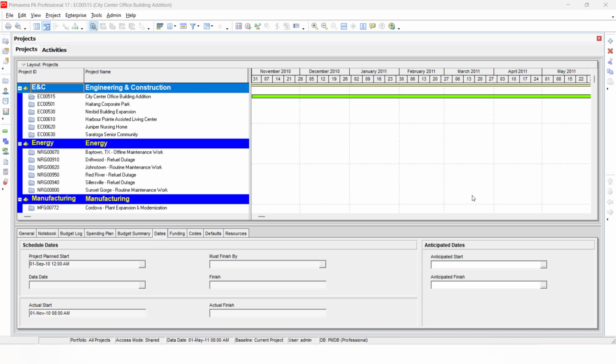For this video, we are going to discuss how to edit the working days or non-working days in a Primavera calendar. This working days editing is the same for the three types of calendar: the global, project, and resource calendar. Before editing a Primavera calendar, especially if it is a global calendar, we have to first check the option used by icon to open the calendar used by form to determine which other projects and which other resources are using this specific calendar.